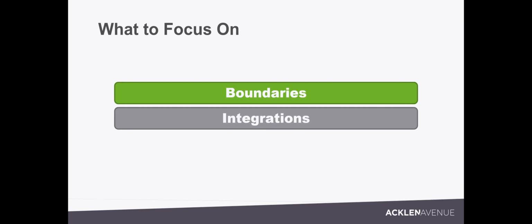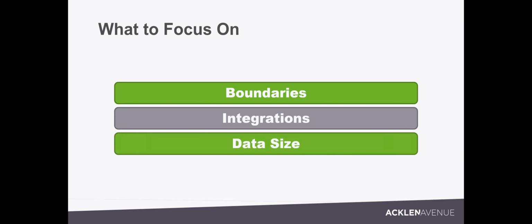One, because somebody will say, oh, they have a well-documented and easy to use API. That is 90% a lie, almost every time. Anytime I touch a system outside of the system I control, the complexity immediately goes up until proven otherwise. So integration points is always a big thing. Anything I have to touch outside of my own system.